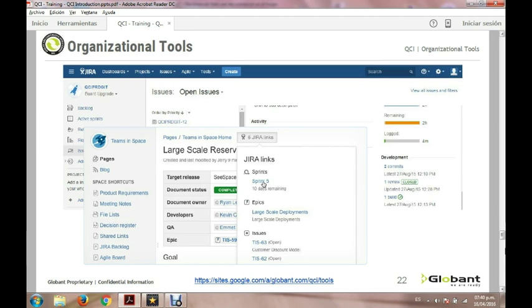Jira instance is used for risk management, learned lessons, decision analysis and resolution, only for Agile and maintenance framework. The instance of Confluence is mandatory as the document repository, at least for plans, status, reports, and minutes. For Agile and maintenance, it is also used for architecture document and planning baselines.